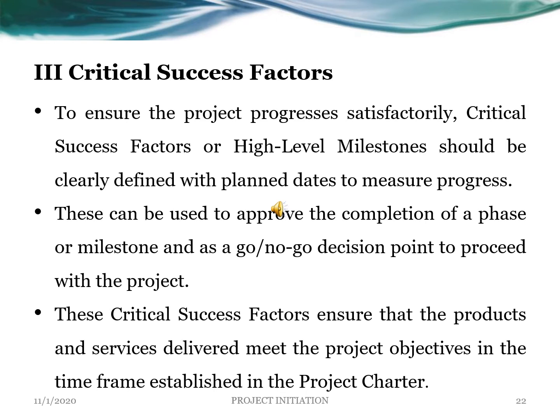Critical success factors need to be highlighted. To ensure the project progresses satisfactorily, critical success factors or high-level milestones should be clearly defined with planned dates to measure progress, without which our project may be just a flop.